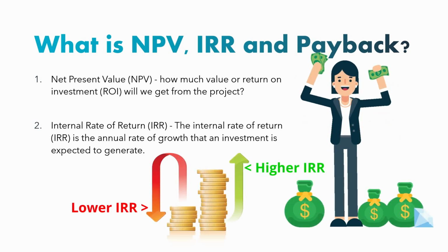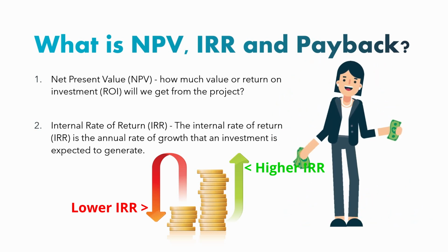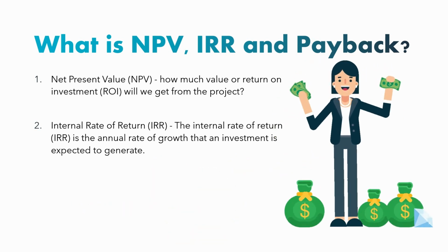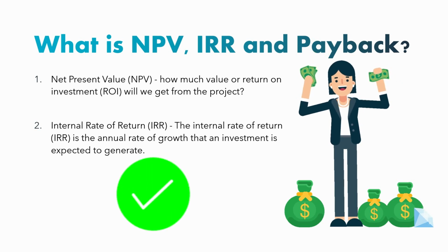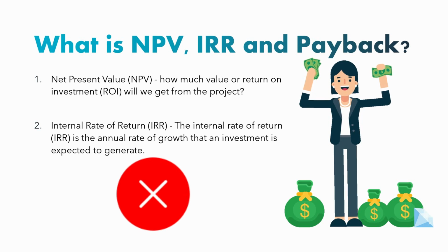The higher the IRR, the more profitable any potential investment is. So, if the IRR is greater than your company's discount rate, accept the project, or if it's less, then reject it.